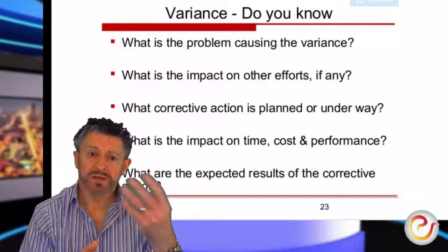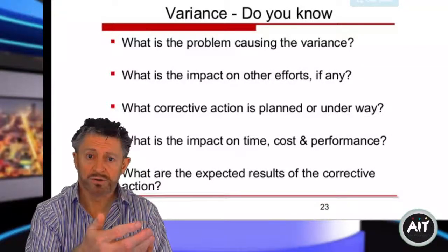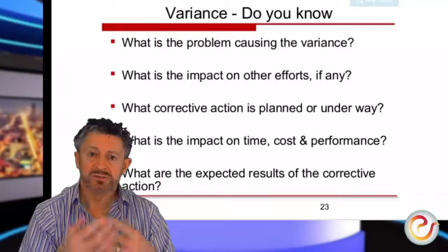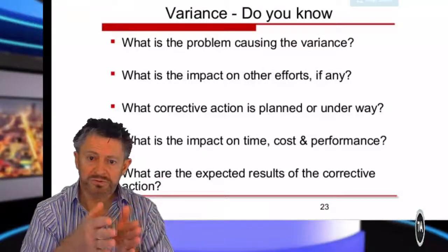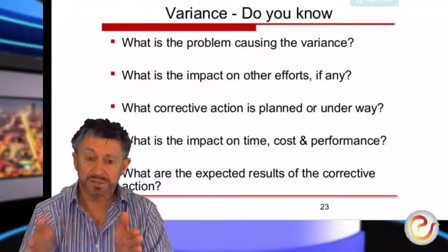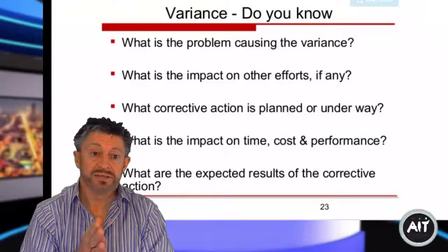And you're also having to pay the block layers an additional 2 days' work to finish out what they should have done the previous week. So that's why people's schedule has slipped, and also the cost has gone up. Right? So can you recover?